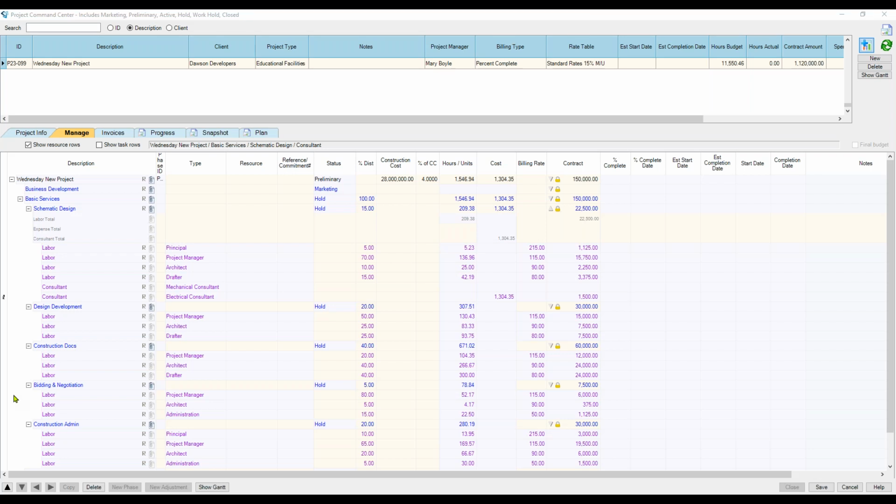Tanya said, does this mean when you're entering a consultant invoice in the vendor invoices and it exceeds the contract amounts, the system will not let you enter it? It's the cost amount here that's going to be verified against, Tanya, because this is your cost, which may or may not be the same as the billing. You have options in your company preferences to warn you and let you proceed, or to stop the entry, but our recommendation is that we're really paying close attention to that because the tool's there to make sure we don't overpay those consultants.